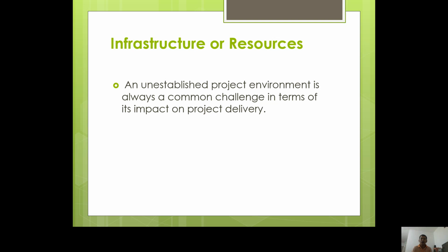Such hindrances bring down productivity and performance of software development teams and impact the overall result. To ensure efficient project development, test and pre-production environments should be made available during the development, testing, and user acceptance testing phases. Invest in a solid IT infrastructure upfront to create a better software development environment.